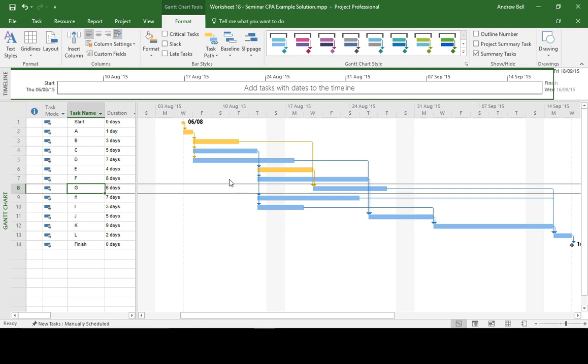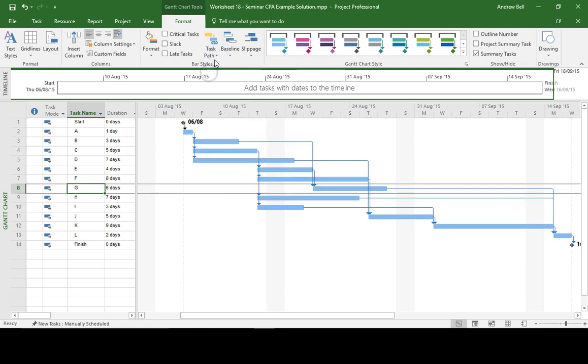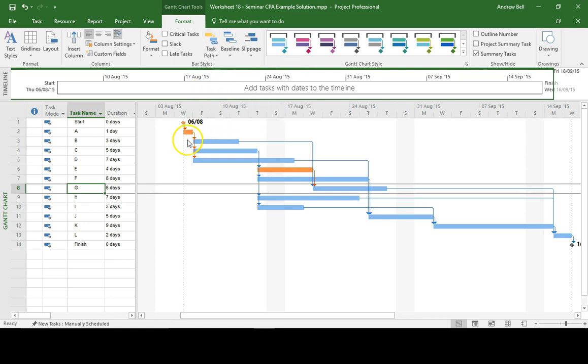But actually, some of those tasks are critical and some are not critical. So instead of just asking for the predecessors, turn it off, I could ask for the driving predecessors, and that's showing me that Task G is dependent on Task A and Task E.